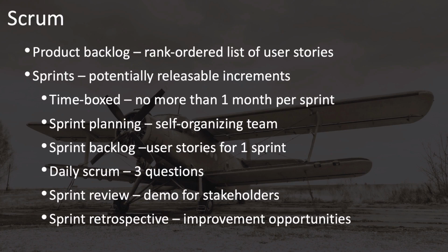Then you also have, usually at the end of each sprint, a sprint retrospective, in which the team reviews things that went well, things that didn't go so well, and to discuss opportunities to improve their productivity, especially identifying impediments which the project manager can take ownership of and work to remove.